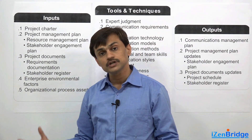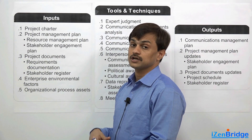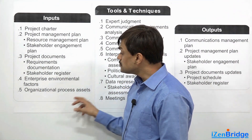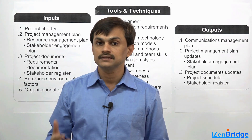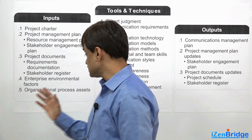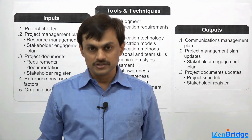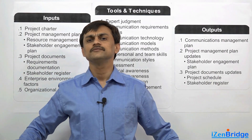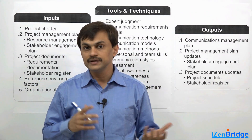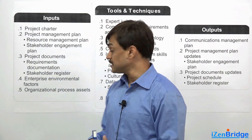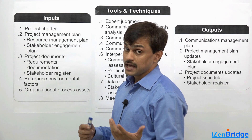The environment related to how things are geographically distributed, what technology is used, and whether team members are working in the same time zone also impacts your communication management plan and communication selection. Organizational process assets capture what the organization has learned about communication and what recommendations they offer to ensure people get what they need at the right time. This includes templates for producing reports — your project may not be the first in the organization, so stakeholders may already be comfortable with standard templates for evaluating project performance, and your project may be expected to follow the same.